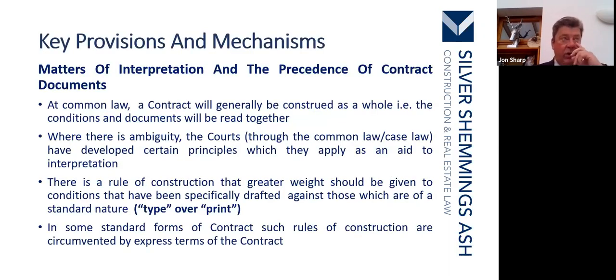We need to look at how the courts, or indeed how an adjudicator, will look at interpreting provisions of the contract. The general principle is that at common law a contract will generally be construed as a whole, i.e. all the conditions and all the documents and all the schedules will be read together when the court or the adjudicator comes to interpret a contract.